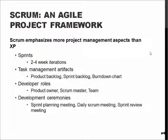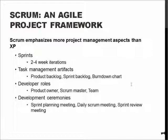We also talk about task management artifacts, which are the product backlog, sprint backlog, and burndown chart. These are basically lists of objectives, use cases, features, or things which we need to do or create for the software. The product backlog includes all the different things we need to do for the product, while the sprint backlog includes all the items we need to do within the current sprint.